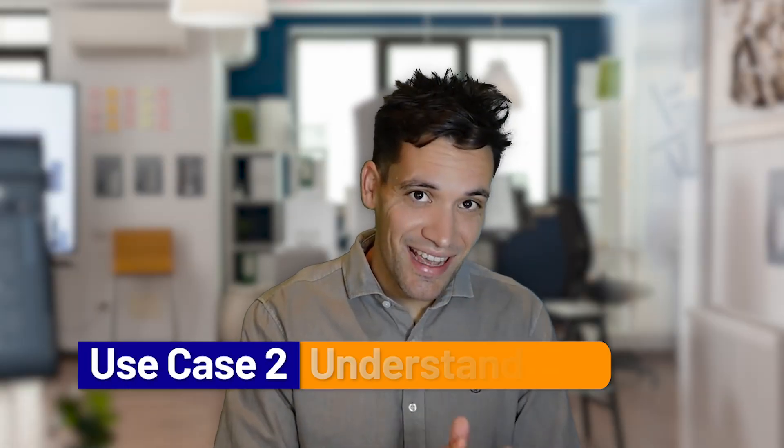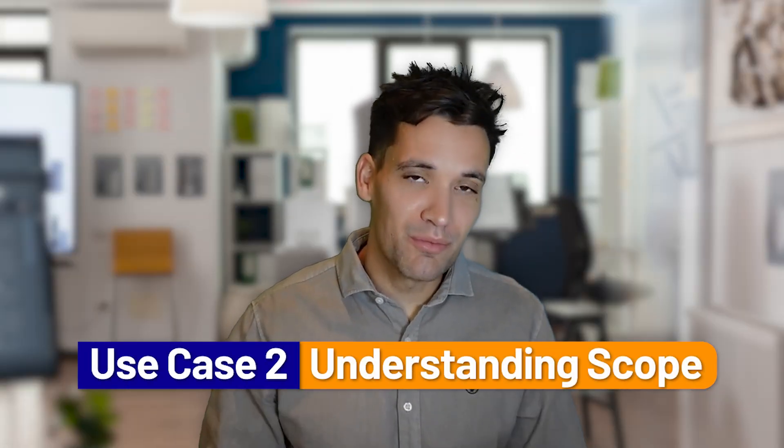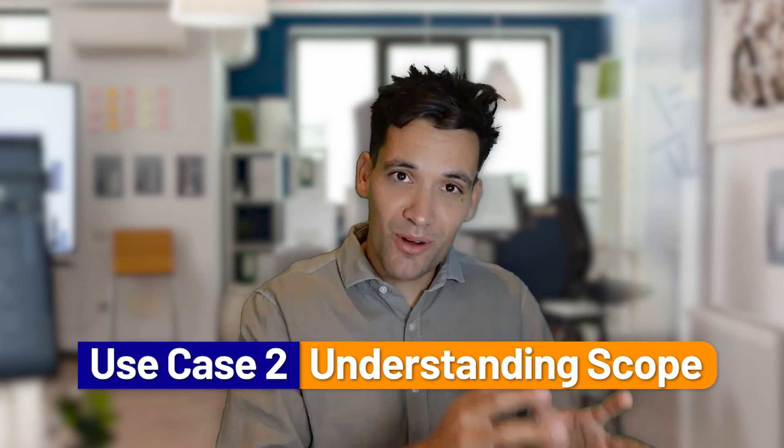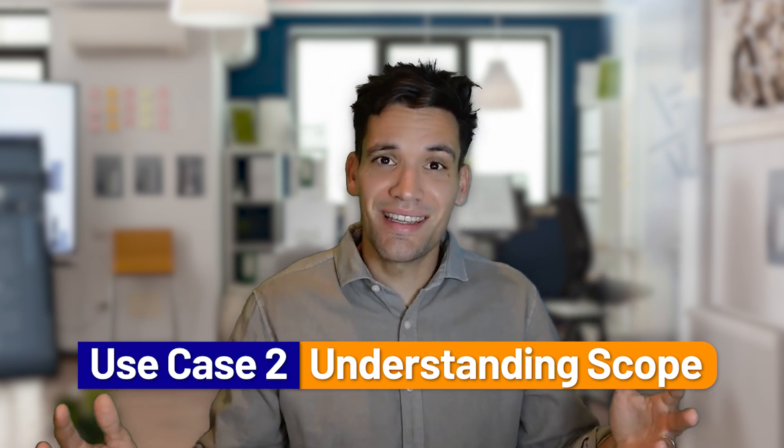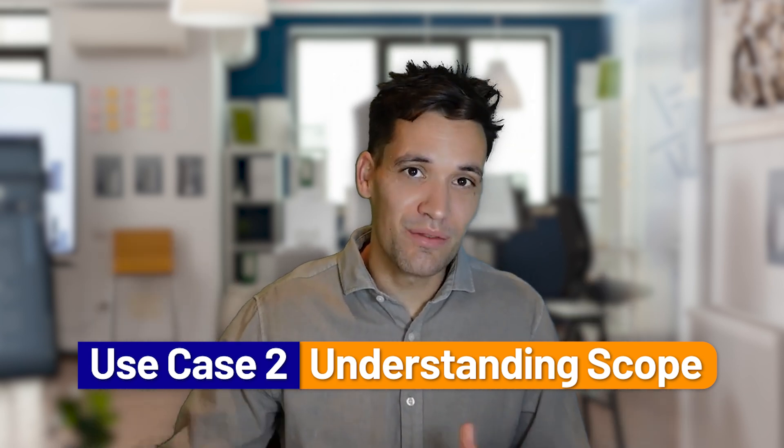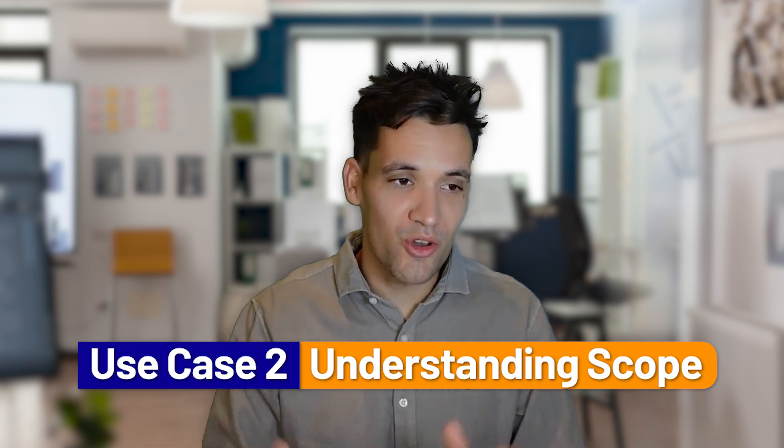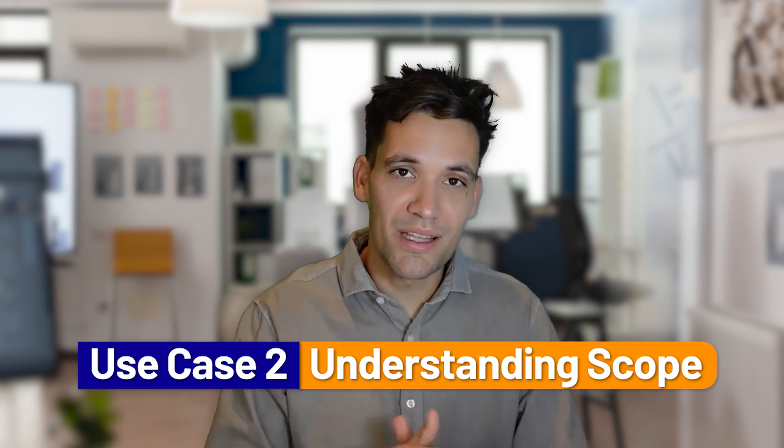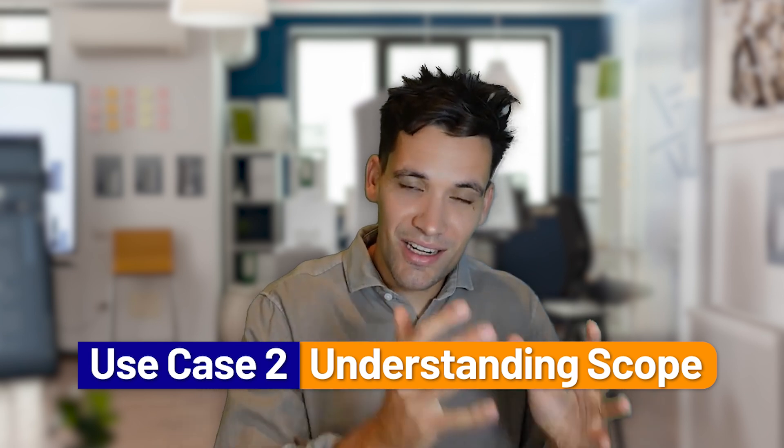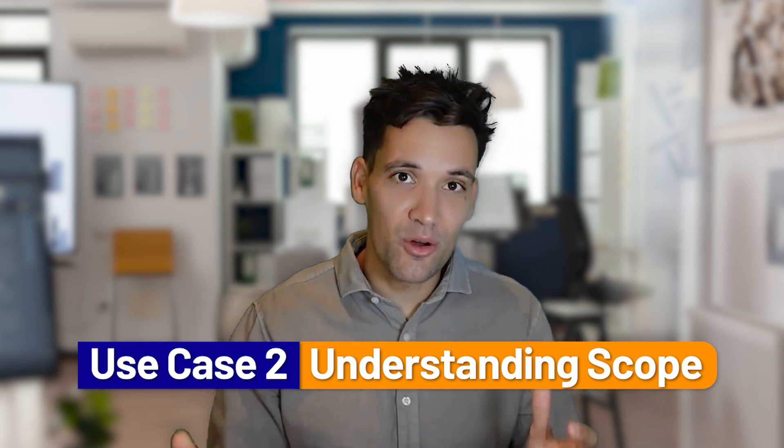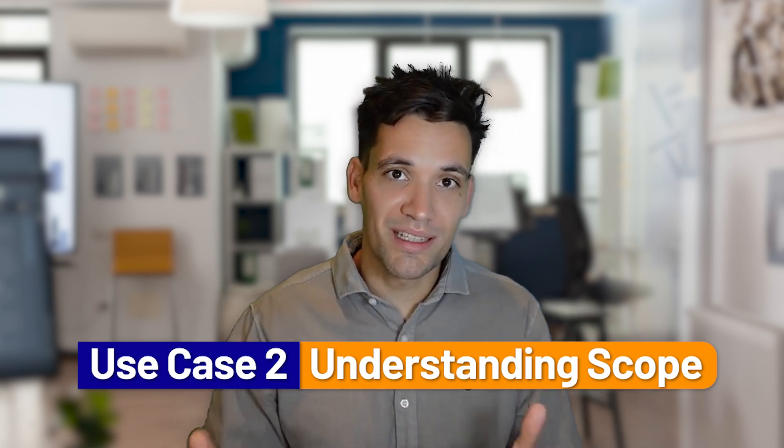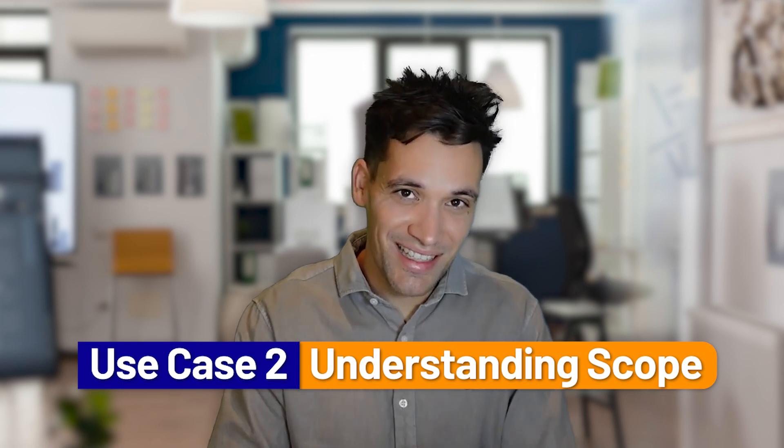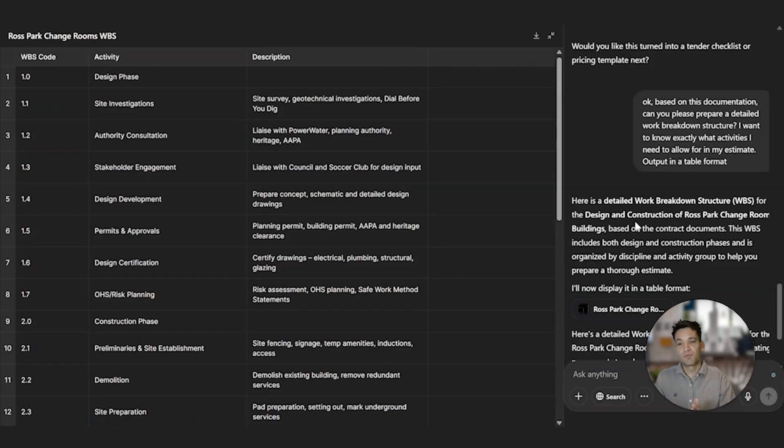Use case number two is understanding scope. What tends to happen when people price projects is they price the tasks they know pretty accurately. If anything, they tend to be a bit conservative. What happens is people miss scope. ChatGPT and other LLMs are incredibly useful brainstorming tools. So you can take an initial scope of works and ask it to help you prepare a work breakdown structure covering every activity in detail.